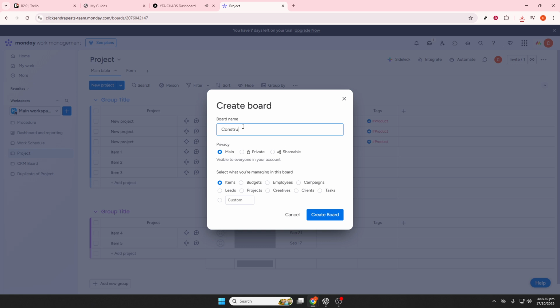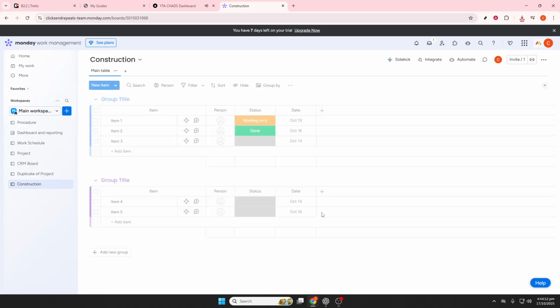To streamline your project management process, consider integrating automation. Automations can significantly reduce manual workload by handling recurring tasks. For instance, you can set up automations that move items to a done group once they are completed or send notifications when a task is due to start. Automated alerts can also be helpful if a task is delayed or when spending reaches a certain budget threshold. This way, you stay informed about the critical aspects of your project without constantly having to check manually.